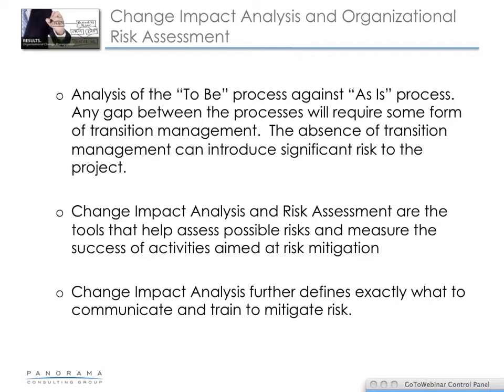Change impact analysis further defines exactly what to communicate and train to mitigate risk. When you do a complete change impact analysis, the majority of those gaps that we identify, most of them can be mitigated through effective training and through effective communication. There are those, however, that will take an entire action plan to mitigate the risk. But a lot of it can be mitigated through communication and training.